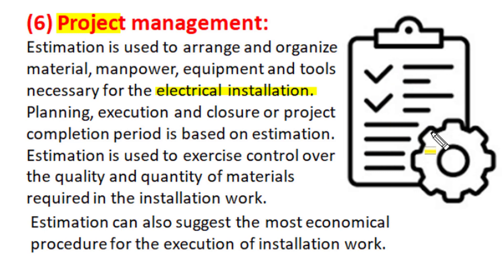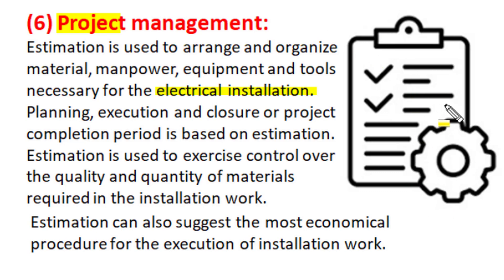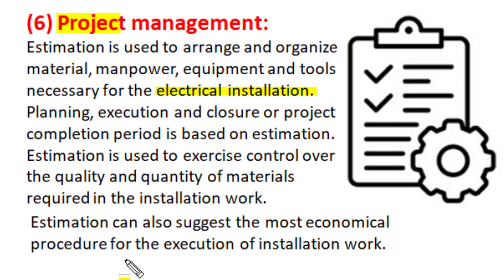If a project is initiated without proper estimation, it becomes very difficult to arrange the right type of material in the right quantity at the right time. This will jeopardize all three aspects of project management — it will reduce quality and scope of the project, the cost may increase, and time to complete the project may go beyond the scheduled limit. A good estimation can improve quality, reduce cost, and suggest the most economical process for execution.